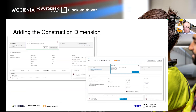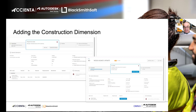When we reach construction, it's important that packages needing approval — such as material approvals from the architect or drawing approvals from a governmental authority — can be sent via packages. You can prepare the package, add the specification and standards, and send it through a workflow. You can group certain documents together into one single package and share it.